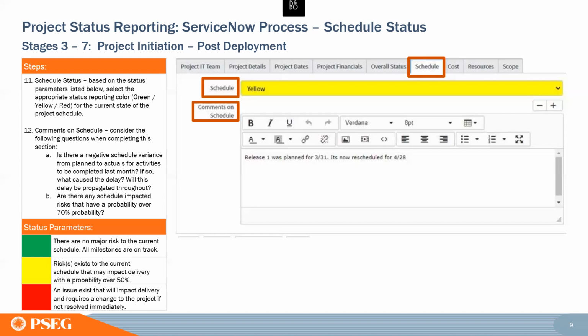You will see later in some of the metrics and things we're looking at is project change requests, how many are happening on your project. So we want to get better at figuring out, have we resolved the risk that caused the problem, or is it propagating every few months and we're just doing a bunch of different justification documents? So turning green is not because you got justification. Turning green is because you solved the problem, or have a short-term solution that you think is going to solve the problem.